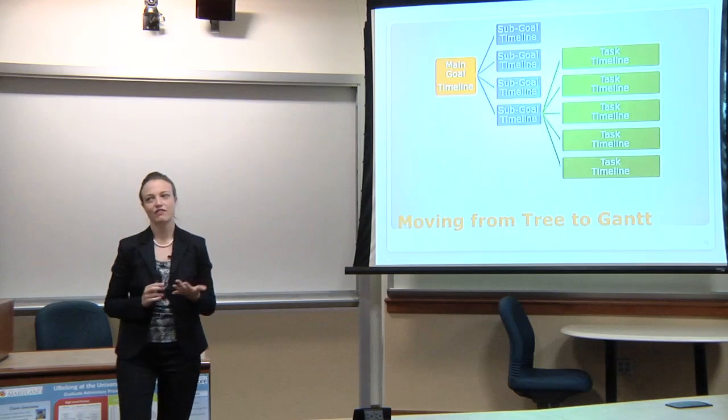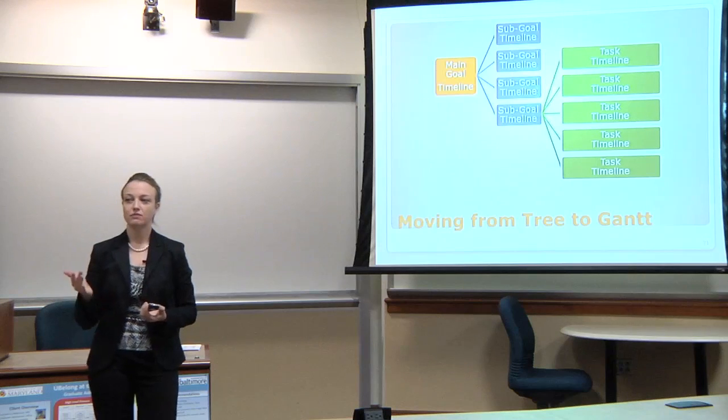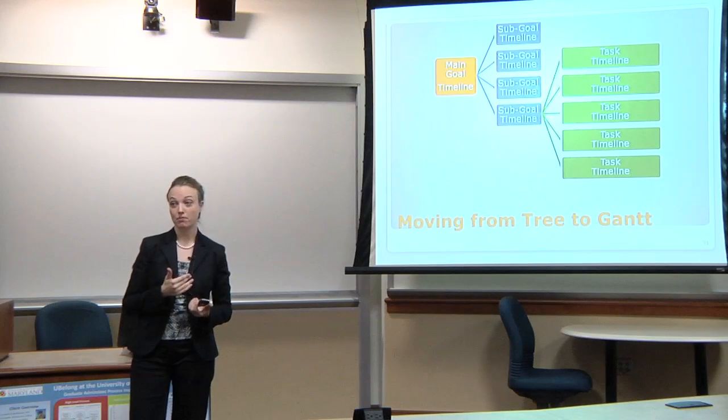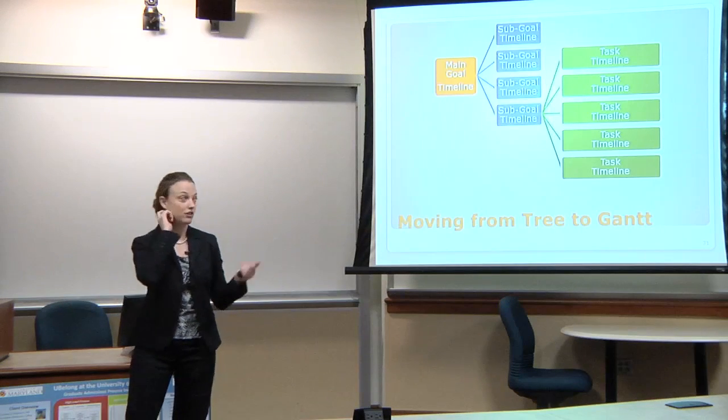If you realize you want to survey 500 people and you're only giving yourself a week, or you only have 2 weeks to do it, then that's a point when you need to take a step back and say, you know what, I don't think we're going to be able to do this. Is there another way we can get at this information? So that's the reason for matching these tasks to the timeline.